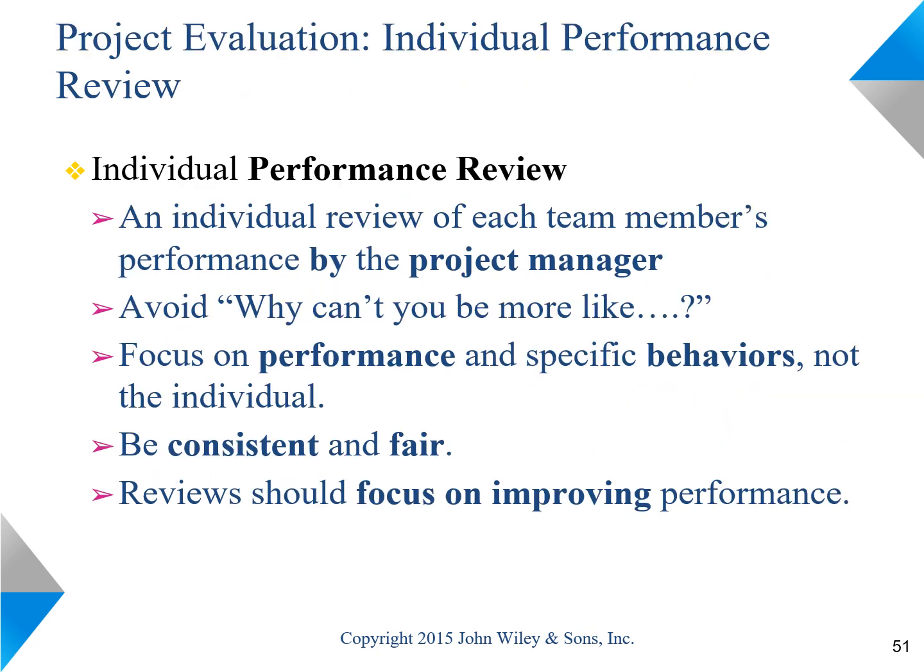It is very important that the project manager conducts a performance review of every member of the project team and makes sure that these reviews are consistent and fair and focus on the performance of the individuals, not the behavior of the individuals. Generally they should have a positive tone that would help the individual improve their performance on the future projects that they get involved with.